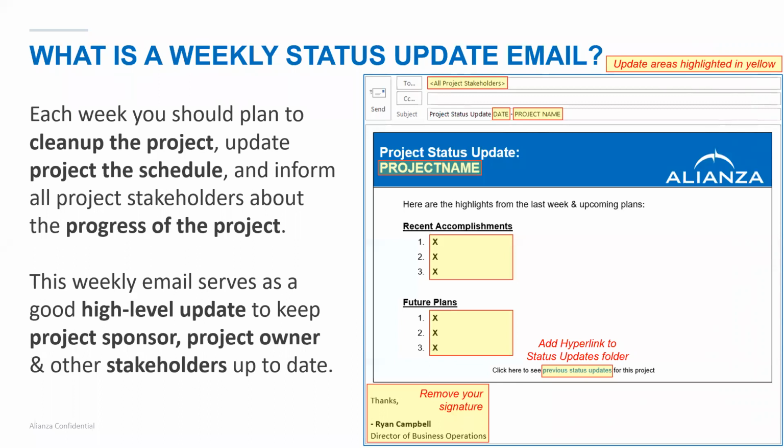define a lot of that. They did mention to have a maybe smaller audience and actually go through the actual project schedule to see the overall progress of different tasks with a smaller audience. And one way I've seen to do that is if you take advantage in Smartsheet of the fact that you can collapse things, then you just collapse everything, and then you only expand into as much as you want to see. So you're above the weeds, and you can drill down if you need to, but you're not showing all the weeds and walking through them. You can keep things rolled up at a high level. That seems to help too.